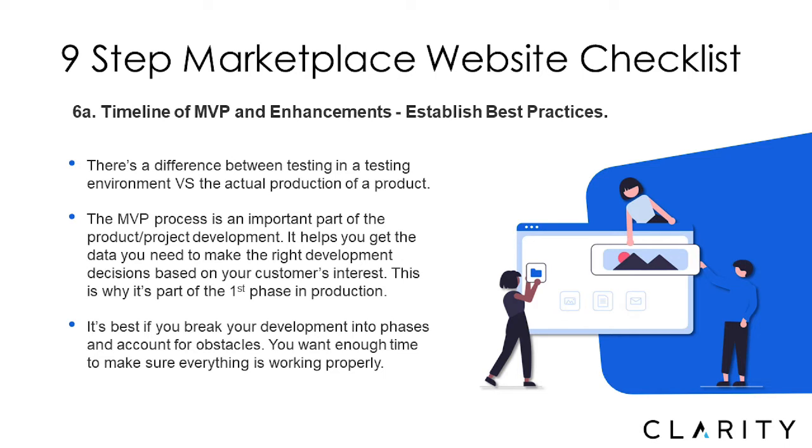You can do this in different ways. A lot of what we like to do, because a lot of our clients know what they need as a baseline, since they have experience successfully operating a marketplace, is this: we know that they need at least six months of effort to get what they need done. But during the course of those six months, we need to be reconciling every month that everything from that month is working. That's a really healthy best practice as well. I don't know if you want to chime in there, Ron, with your thoughts on this, depending on where the business is at as well.